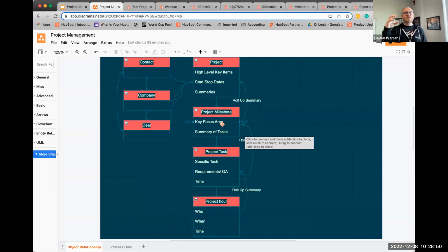But maybe it's always consistently 22 hours or 23 hours. You might want to change your pricing model to the client because you're actually going above the hours that you want to, depending on how you work your business, right? Maybe it is the fact that you tell them it's for 20 hours, but you're always going to get 25, and that's what's expected, and your margin matches up in utilization for what you need based on the cost maybe of that employee. That's another thing that you can put in project hour.